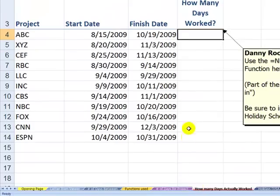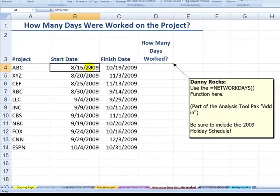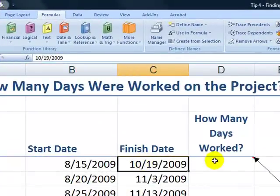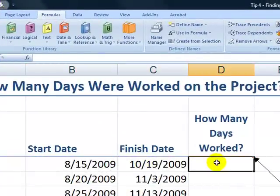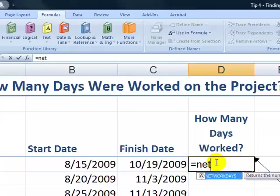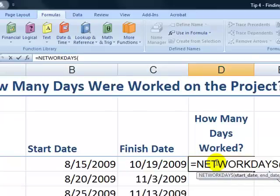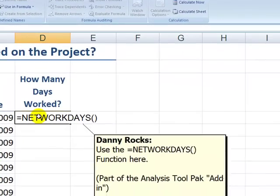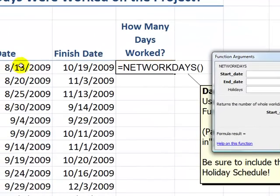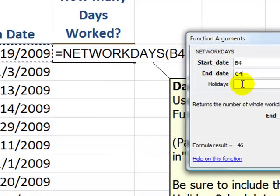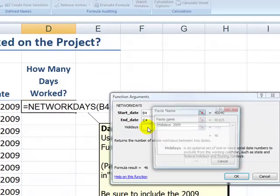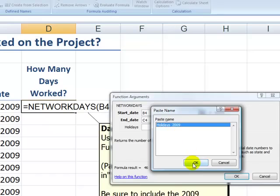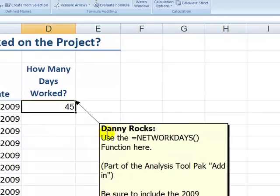Now let's look at the project from another perspective. This time we have the start date and we know the finish date for the project, and we want to know how many workdays will be in there. We're going to use the NETWORKDAYS function. So equals NETWORKDAYS, function autocomplete, Tab, then Ctrl-A for function arguments. Start date for the project, and the end date in C4. Our holidays named range — F3 gives us holidays_2009. Click OK.